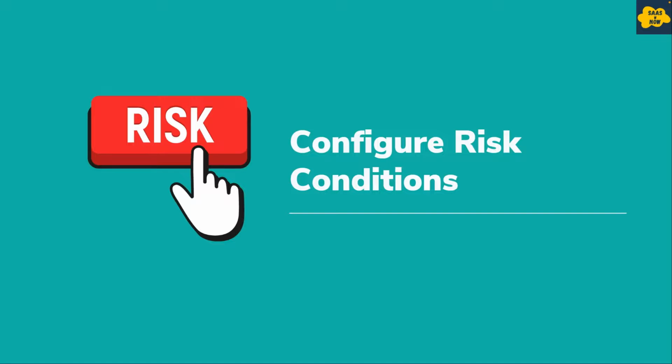Assessment of risk is really important in the change management process, because before you implement a change, if you don't assess the risk of that change, then it can definitely have severe impacts on the infrastructure or different applications of your organization. So ServiceNow gives a feature where you can configure different risk conditions. And on the basis of those conditions, if you want to populate the risk of that particular change, then you can do that. So let's see how exactly you can configure risk conditions.